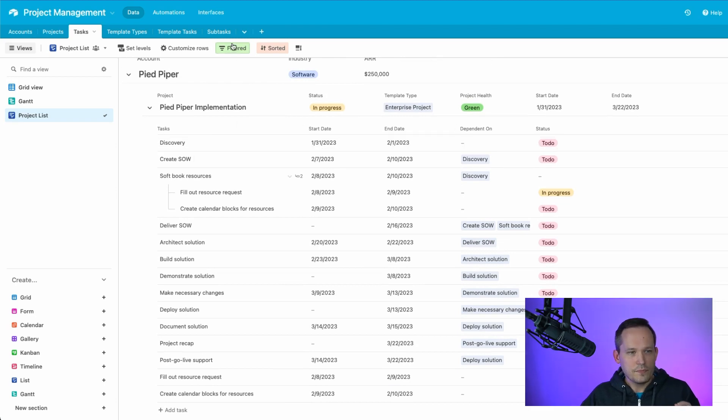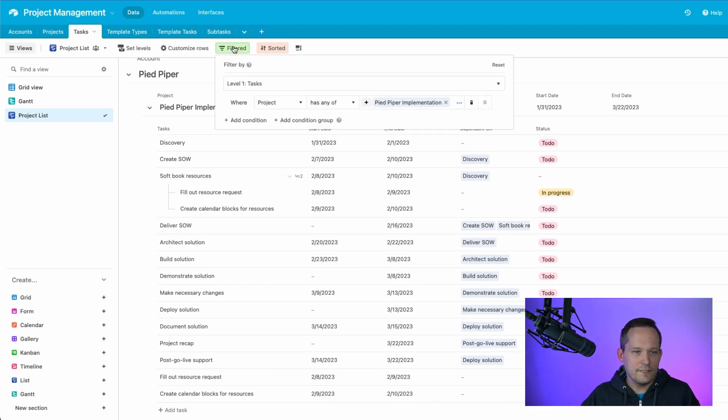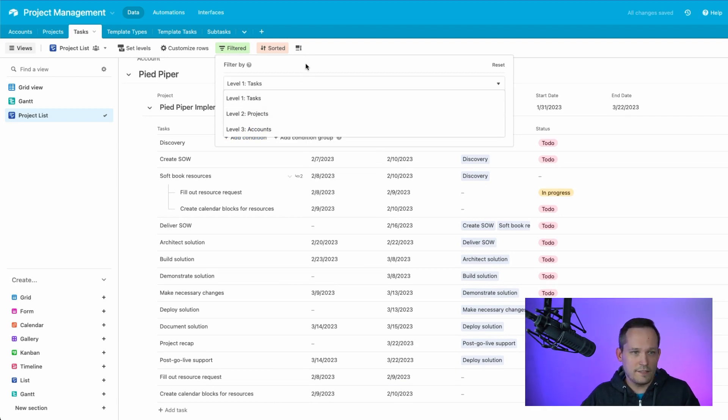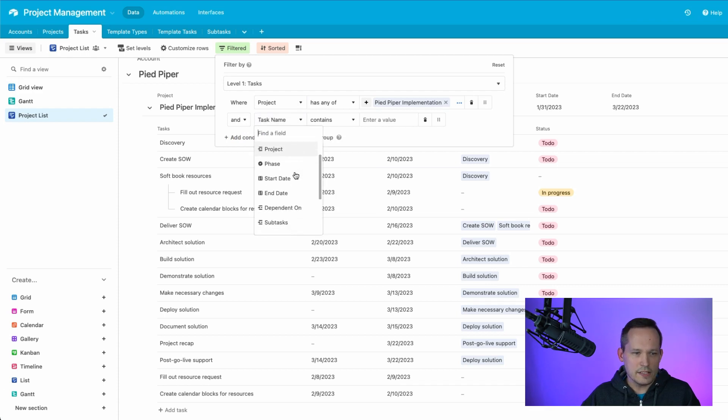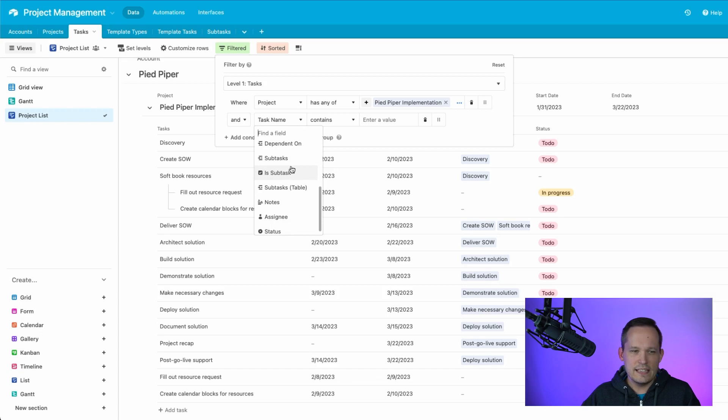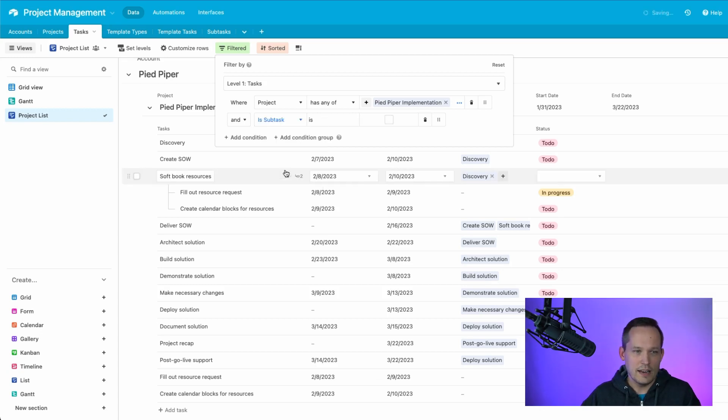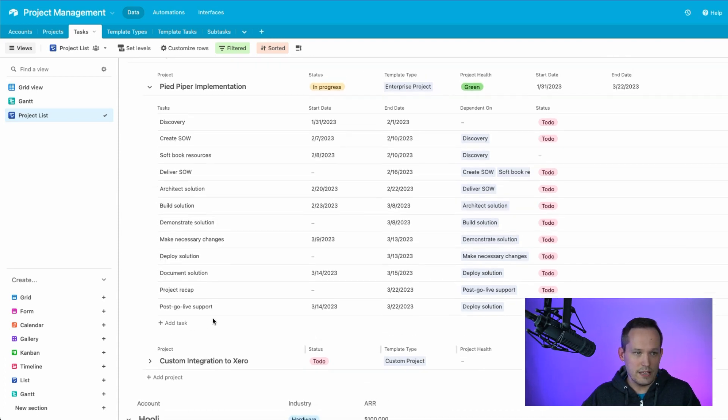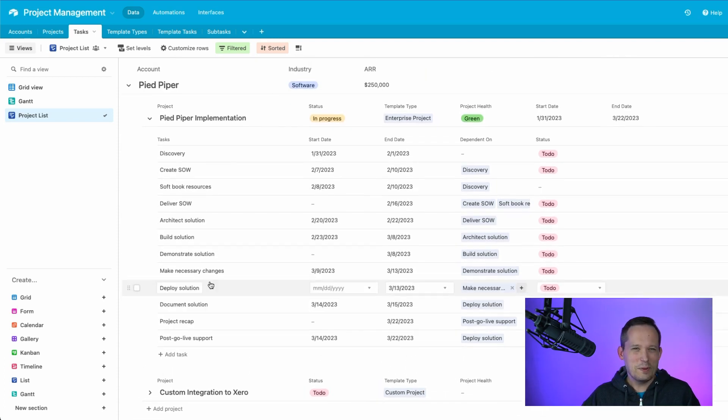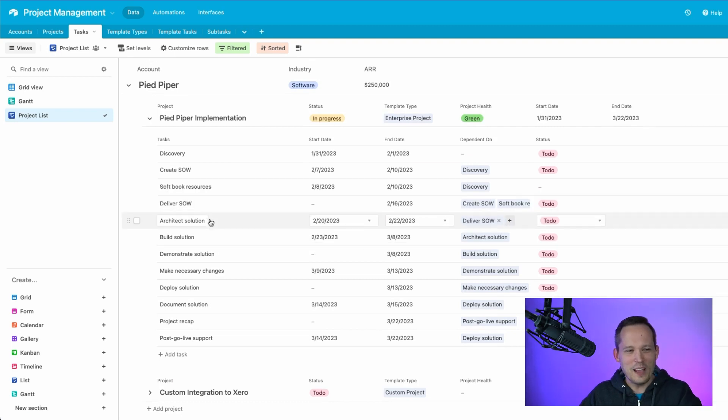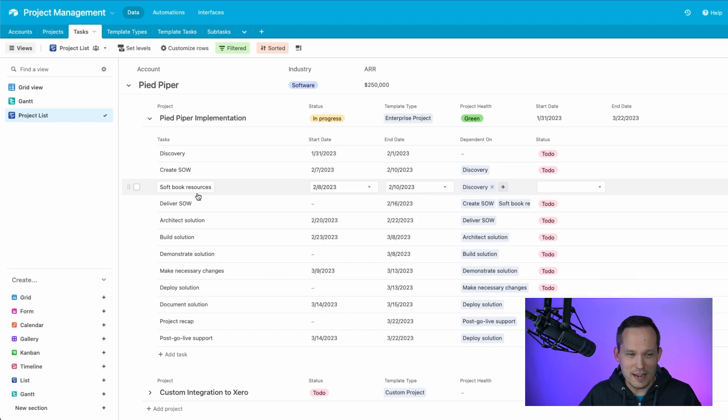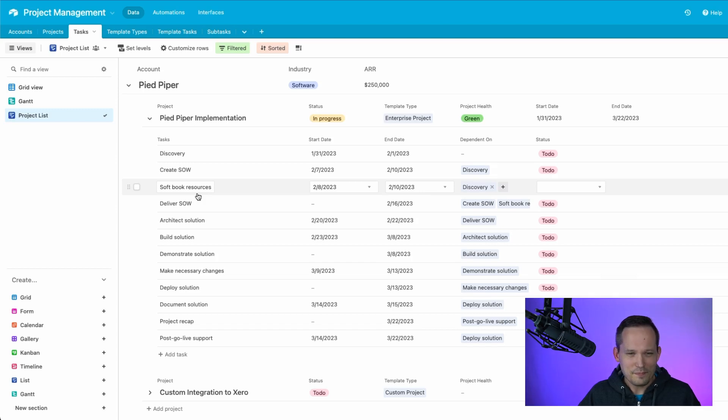What I really wanted to do was to add a filter here. And what I did was I added a condition and you can add the conditions at different levels. I love that filtering ability. That's awesome. I created a special field and I did this really just to see if it would work. It's kind of silly to create a is subtask field, but I did that just to test it out. So if I said, if it's not a subtask, then we want to be able to show it. We'll notice that that filtered it out. We don't see those two here, but now they're also filtered out of the subtasks out of the nested area. We don't see them anymore.